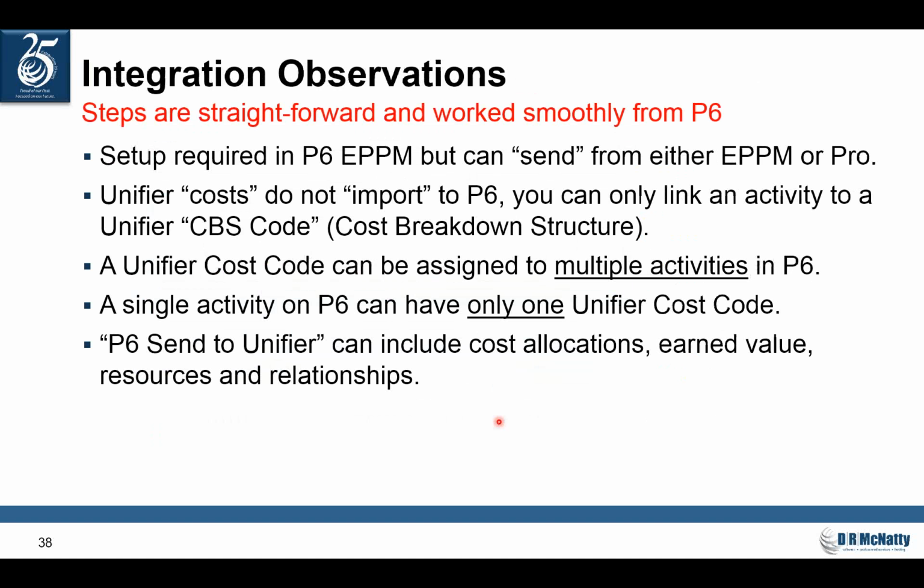So, integration observations. I did this because, in my opinion, Unifier does not do an adequate critical path schedule. It does an adequate bar chart to drive cash flow, and if that's all you need, then that's all you need. You don't need to do P6. But if you want Unifier to be driven by what I consider to be a better schedule, then you would use integration.